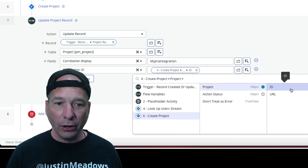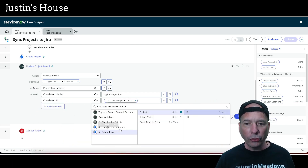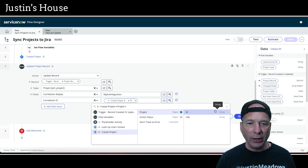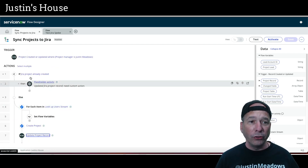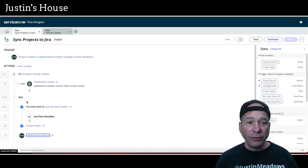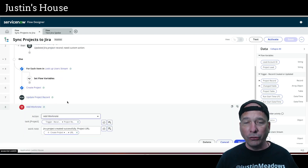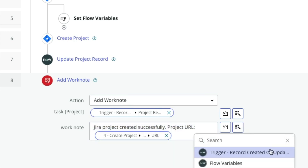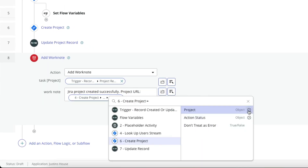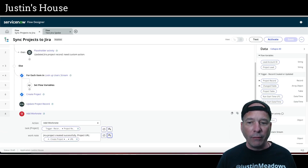From the create project step, under the project field, there is an ID we can choose — that's the JIRA project ID. That's going to be stored in ServiceNow so that the next time there's an update and the flow runs, it's going to stop at the if-check and never go to the create path again, because it already knows the project exists. As a nice finishing touch, we're going to add a work note to the project: 'JIRA project created successfully,' the project URL — and you can find that URL under create project > project > URL.